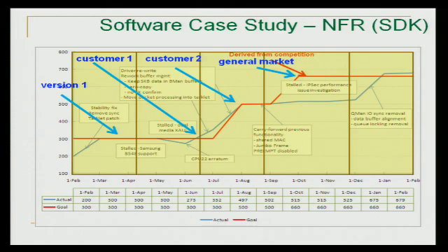This is real life measurement, quantitative data. It's not me going back to the business unit and saying, yeah, I think it's fast enough now. We have to go to a formal review to show these measurements before they sign off that I met that requirement. So these crawl charts are a very common part of how I measure non-functional requirements.